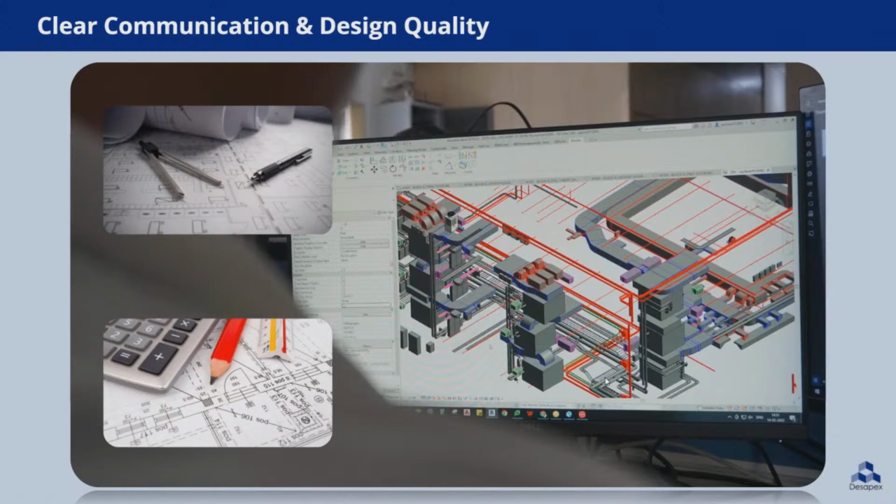About design quality, digital twinning can also improve the quality of modular projects since the components are made offsite. Modular construction requires the measurements and quantities of building components to be accurate. If the construction of a component differs even slightly from its design, the modules will not fit together correctly, which can increase the project cost and cause delays.